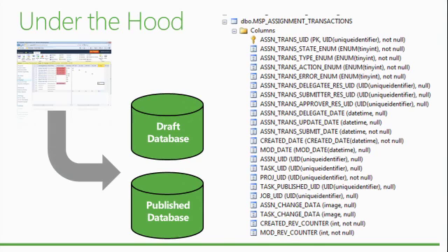What happened to that stuff? What type do I have, and what's the status? What is the action? It's basically in progress, approved, or rejected. This is the state, and it's in there in the published database. Is there any error that happened when it was processed by the system, not by the end user, by the system? And at the beginning, as you can see, the first few columns that end with enum actually have a value in there that means something.